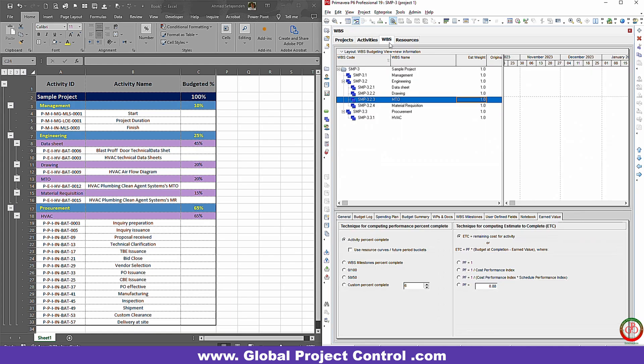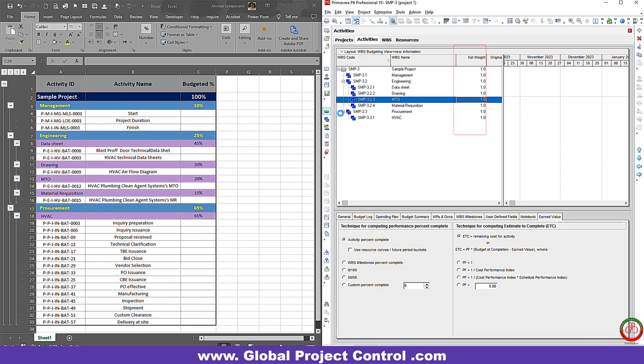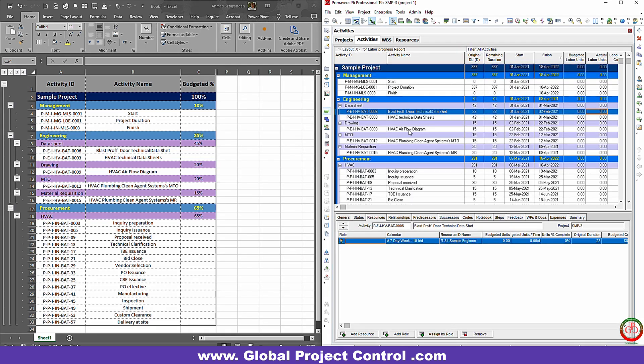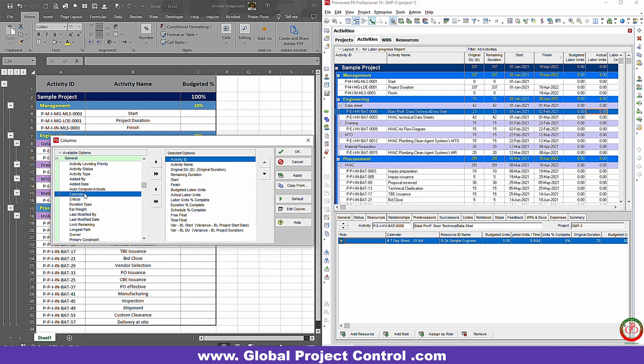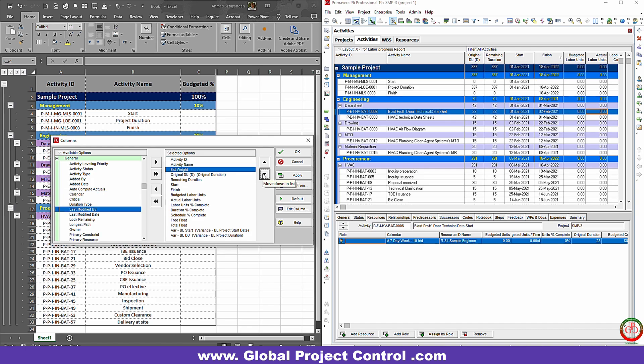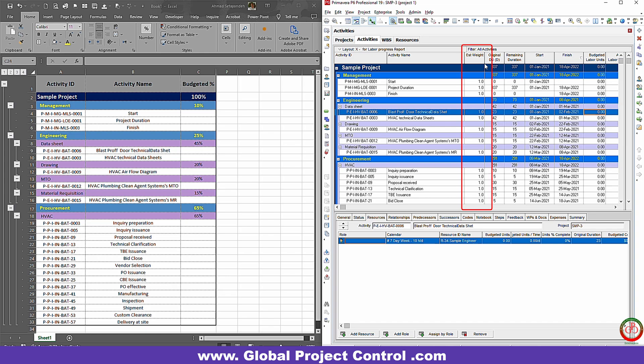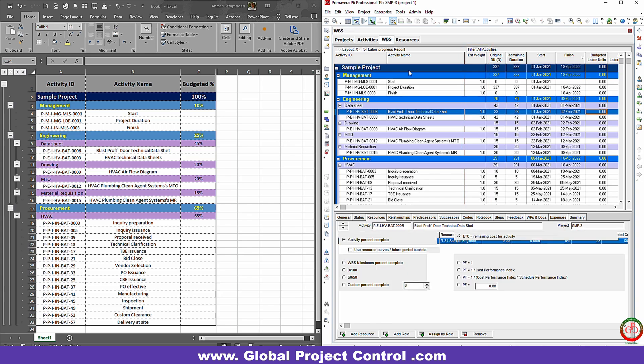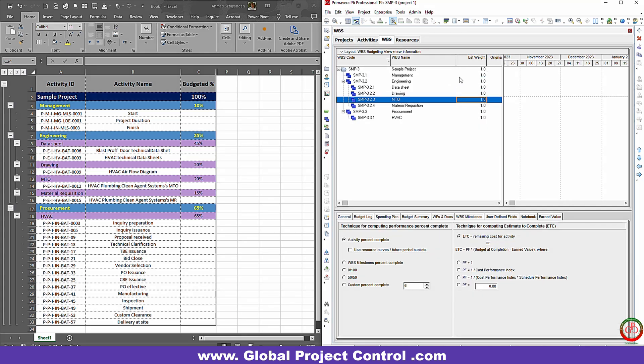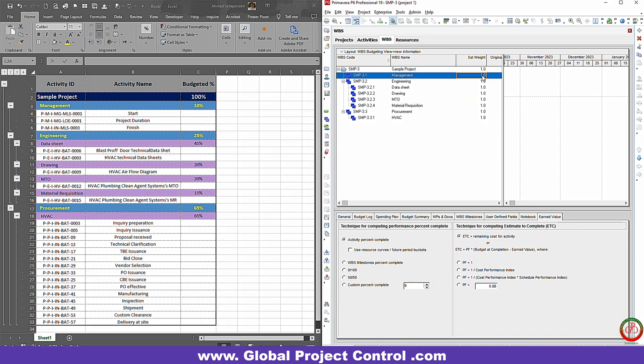On Primavera P6, in the WBS section, we have the estimated weight over here, and also we have the estimated weight over here too. This estimated weight helps us to assign more weight to some activities, and this estimated weight helps us to assign some weight on the WBS.